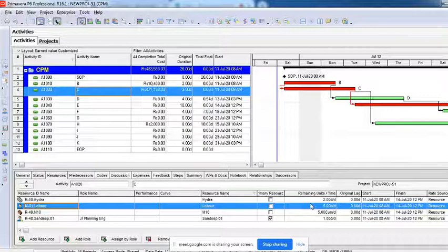But who knows after 6 months what projects will be there, when and where the human resources are working. Right now I cannot commit any of the human resources. You're asking for 5, and these are only proposed human resources. We call these proposed human resources. It's not approved human resources. You're just asking for it, but nobody has approved it still.